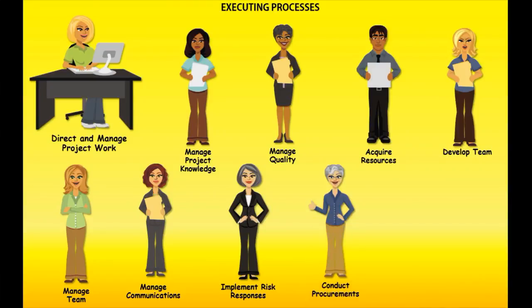The next process is called conduct procurements. In conduct procurements, we are carrying out our plan for procurement. We are sending out RFPs, RFQs, RFIs, all of those procurement documents. We are getting responses back from sellers, potential sellers. We are getting questions. We are giving feedback to those potential sellers. And we could be carrying out a bidder conference. And we are helping the potential sellers to really understand the project. And then we receive those proposals back from them. We review the proposals, and then we award the contract to a seller or sellers.